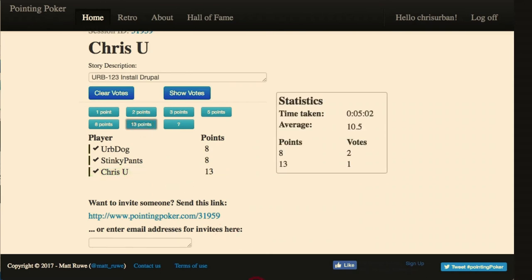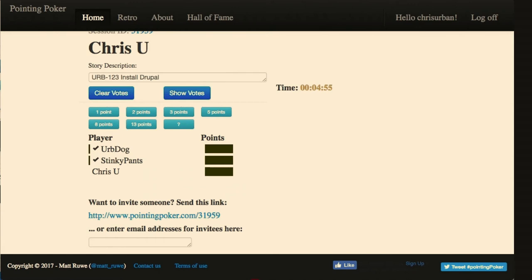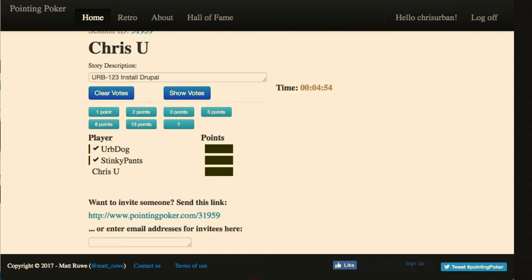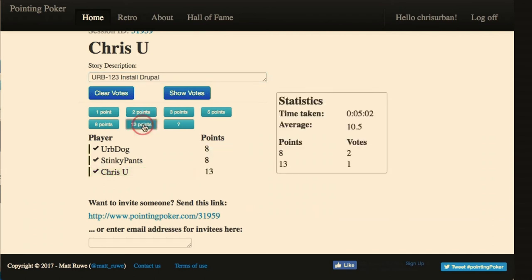If that's not clear, or if maybe there's some weird entity reference that somebody's not getting, you would be able to figure that out immediately because they're sizing it differently. If everybody understands it the same way, they should all size it the same way, right? In theory. So this is basically using the knowledge or the wisdom of the crowd most efficiently. And if you can do it time boxed, you know, you groom a ticket in 2 to 3 minutes, it really shouldn't take more than that. You can blow through, you know, 30 tickets in an hour, which is a lot, which means you only need to do this twice a week and you have your next sprint pretty much ready to go. That's what you should be doing.